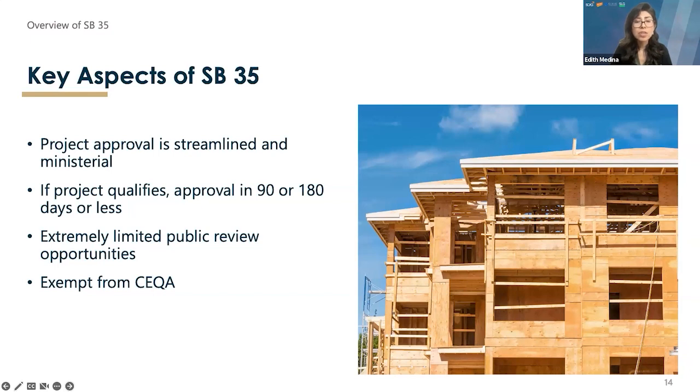There are extremely limited public review opportunities for SB 35 projects because it's ministerial, so that means there are no public hearings required. However, design review or public oversight can be conducted. And the projects are exempt from CEQA because CEQA only applies to discretionary actions.